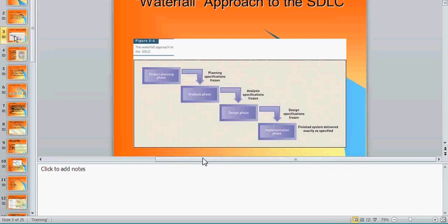You can go through an exception process called the change control process, and you can incorporate a change. All right, you can make an amendment to your original project plan, to your original requirements, to your original design. Are you clear so far? When you request that change, you must analyze what is the change, why are you asking, all that information.